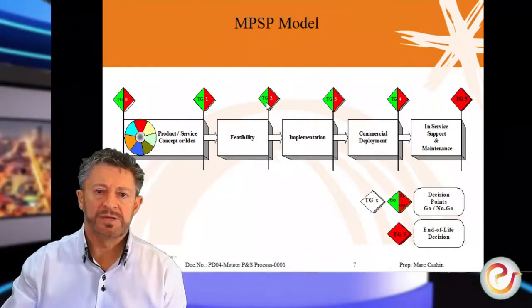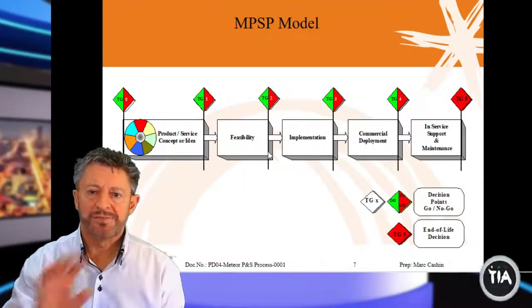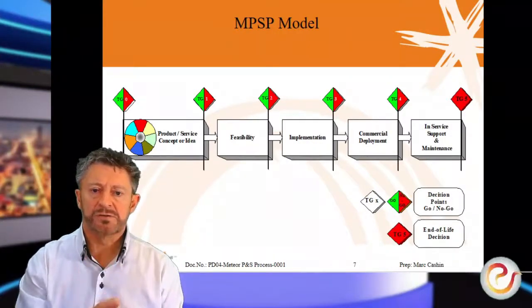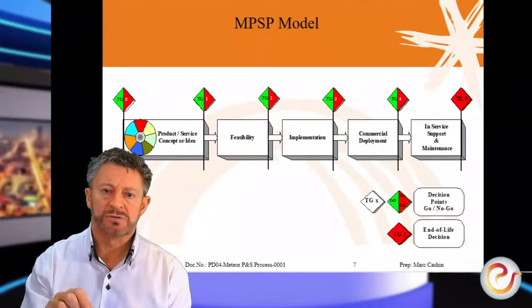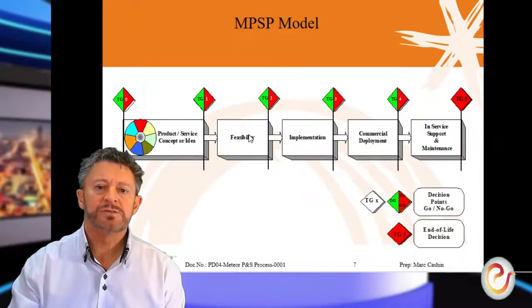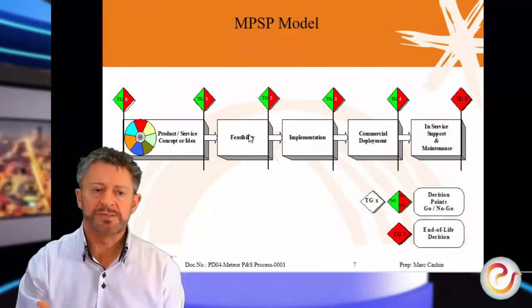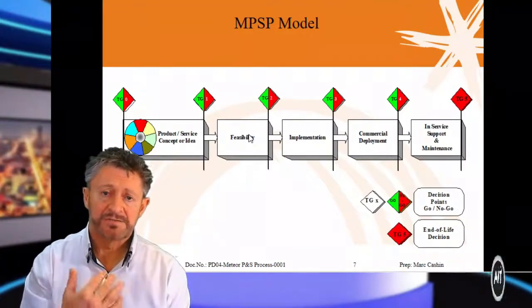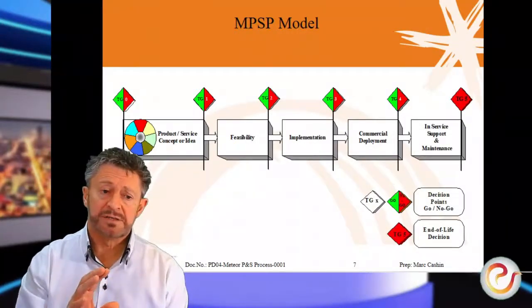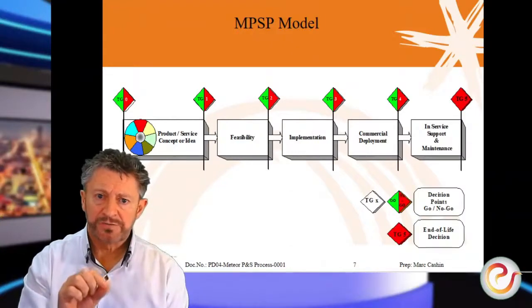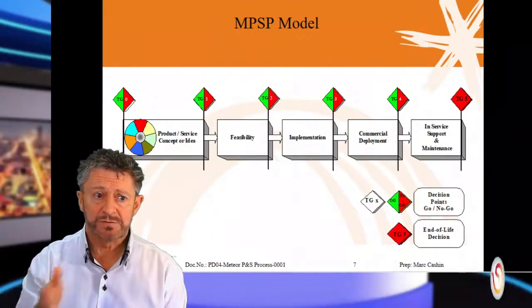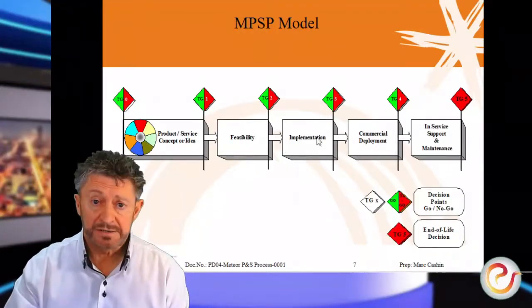And then we'd go back and have another meeting and say, yes, we have everything in place. We have all the elements we need. This is how long it's going to take, and this is precisely how much it's going to cost. Because the first draft up here, although it was fairly accurate, we'd go into more detail. That's why we'd have a feasibility, essentially the planning phase. We'd go into a lot more detail to make sure we'd covered everything, that there was nothing we missed, and then the logical sequence of how we're going to do things. Then we went off and did it.